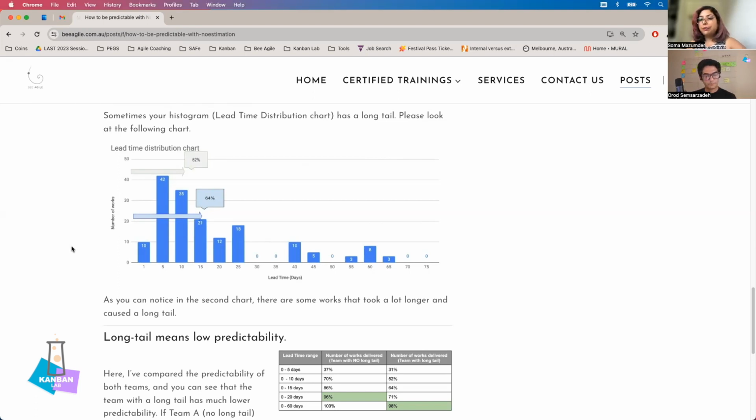And there could be different kinds of reasons. One could be that they are dependent on other teams, and the other team's priority is not the same as theirs. Or it could be a lot of context switching. It could be changes in priorities. It could be that tasks are not refined and are big. Or there are lots of unknowns which they failed to understand in the beginning. They started the work and found out that the complexity level is too high. Or quality is low, and we found lots of bugs during the test and QA and stuff like that.